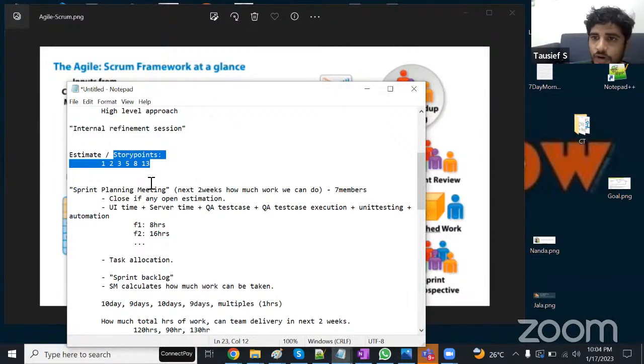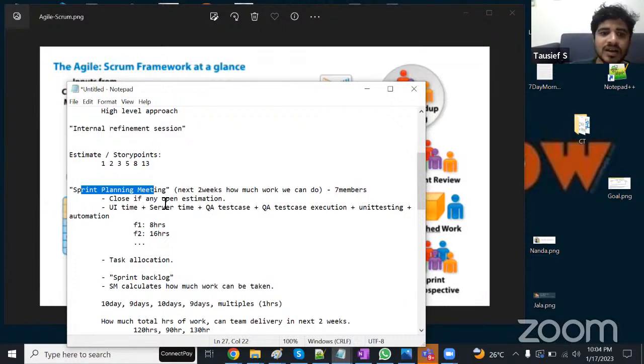Next, every developer also plays a very critical role during sprint planning. As part of that, you would have to get into details, even sometimes closely estimating how much time it might take to finish that ticket. Next, if there are some questions which are not answered, you need to tell your team members, hey, I'm still waiting on these things. They are not yet answered. If we pick it up and later on the requirement changes, it will be rework. So are we okay with that? You need to really understand the tickets and ask these kinds of probing questions.